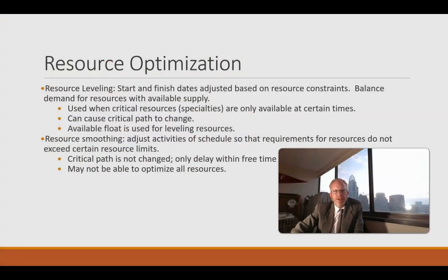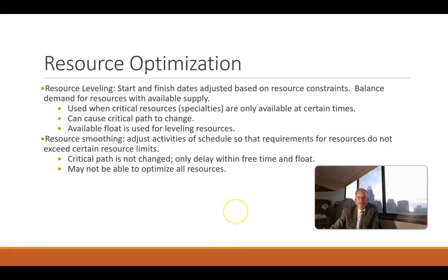So with resource leveling, what we can do is say, okay, this is when that person's available, or when whatever, could even be a piece of equipment. Maybe it's a crane or a bobcat or something like that. So this is when that's available. Let's adjust where we can to fit that schedule. If we can adjust using float, great. That's an easy solve.